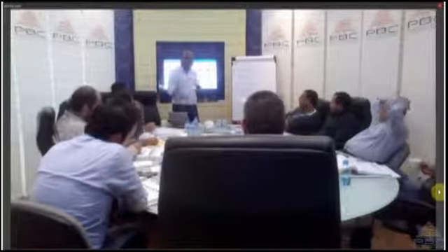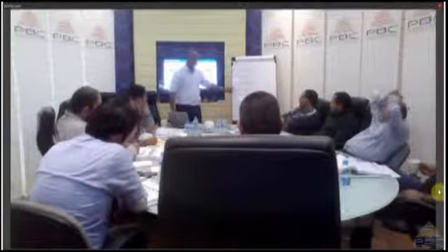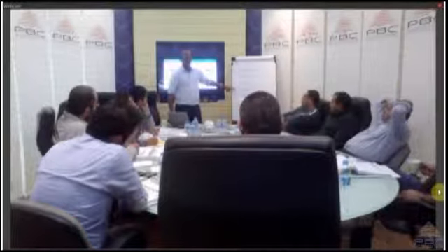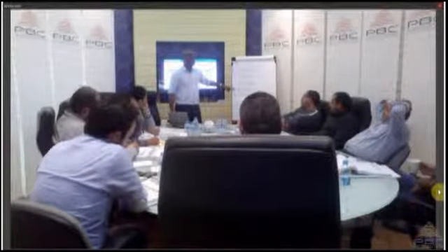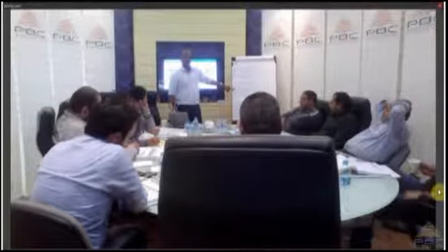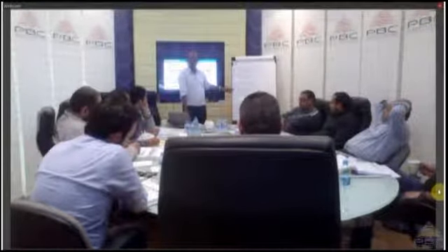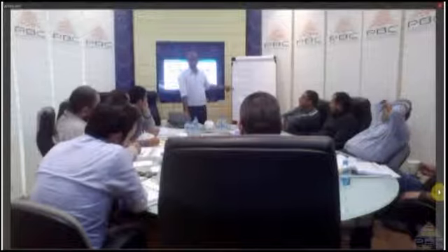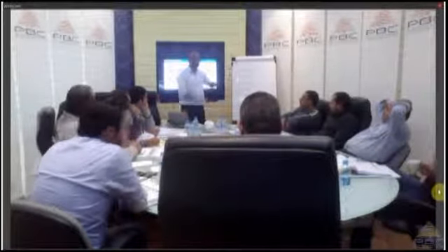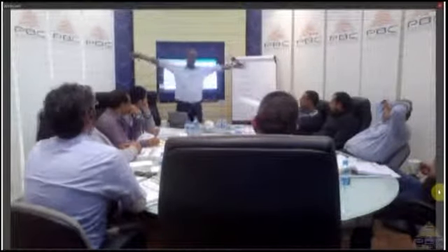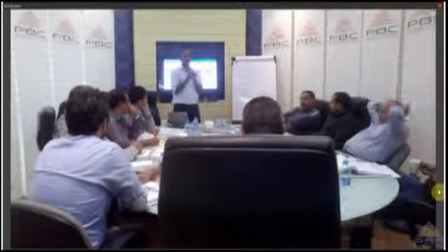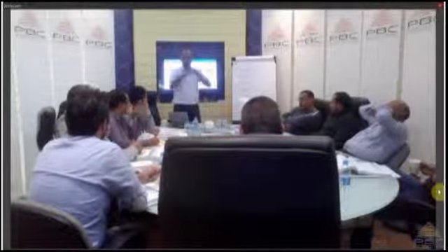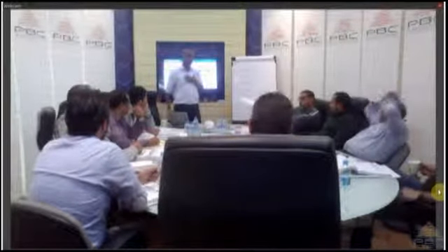Now, Said mentioned something about D and E. He said they are unprofessional. Right? Or maybe they are very professional. Or maybe you are the one who's not professional. How? Because when I get this huge variation in proposals, the first question should be asked to whom? I should question my proposal.